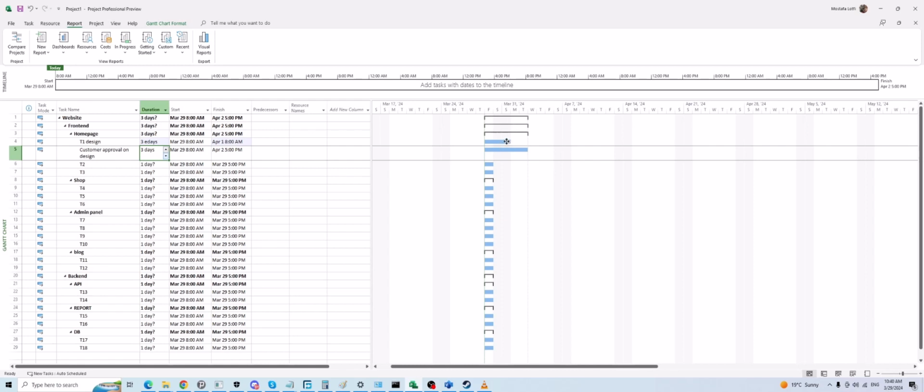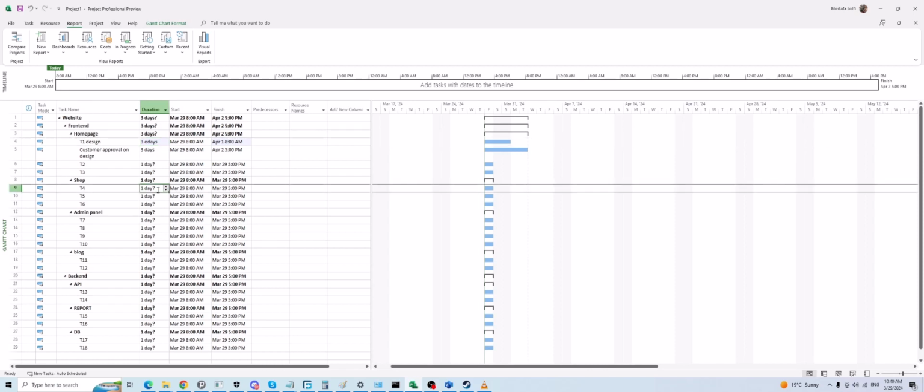But it's a little bit more. It is also ignoring the end of working hours. It means three days non-stop, without stopping. 3 full days working. Okay, remember this point.